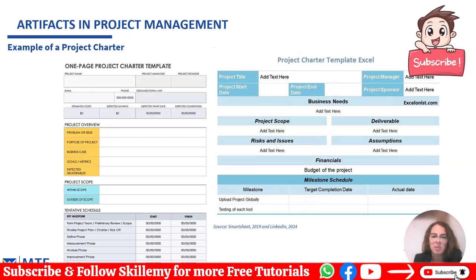So next one, we see a more simple one, a project charter template in Excel. You can do these templates also in Excel. You don't need to have a really sophisticated software for that. You can do it on Excel. It's totally easy. We have several templates online that you can use for free. Okay, you see here the project title, the start date, the end date, the sponsor, the project manager, the needs of the business, the scope, the deliverables, the assumptions, the risks and the issues, of course, the financials, the milestones, and the sign-off of the project, etc. So, what are the functions of this project charter?